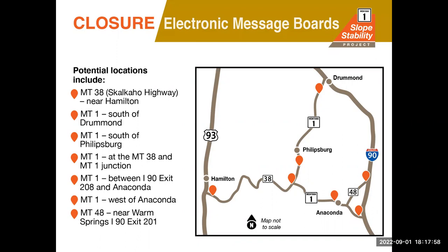They will be providing closure information at least a week in advance of the planned closure. And like Matt was saying earlier, if the contractor is able to give us a schedule or a timeline, right now they're thinking the first week of October, but we'll wait till they can assess things and see how work is progressing, because there's things that need to happen before that closure.